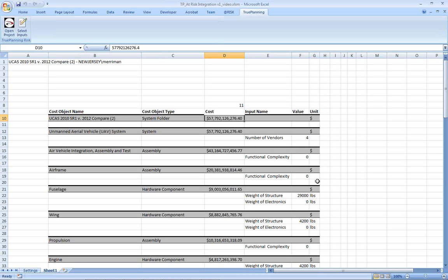Also, it is possible for an input to be set to a value that will create a model that won't run. Obviously, you could theoretically create a distribution that would produce inputs that are invalid. You want to avoid that. You'll get an error message when you're trying to set it. But additionally, it is possible, with all valid inputs, to produce a model that won't run, whether it's a date issue or you get something out of range, or you spike something in some odd way and it just pushes it beyond some threshold.